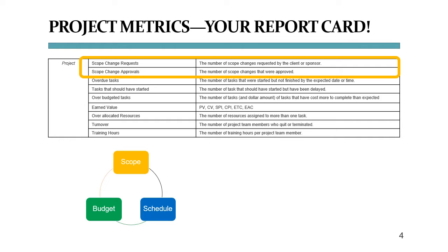Naturally, if scope change requests are being filed and they are truly necessary, they should be approved as well, which means that the difference between requested and approved scope changes can be used to interpret how well you interact with your clients. As I said, this is a waterfall thing, obviously. In an agile project, you would instead track changing priorities in the product backlog. But then the person to make those final decisions on the basis of what her customers would like to see in the final product is the product owner.